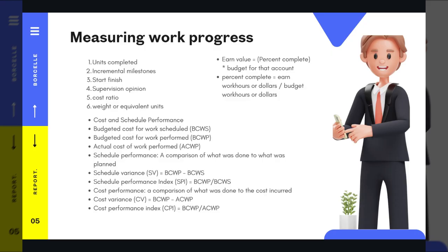Also, the earned value formula equals percent complete times budget for that scope, and the percent complete equals the earned work hours or dollars divided by the budget dollars.